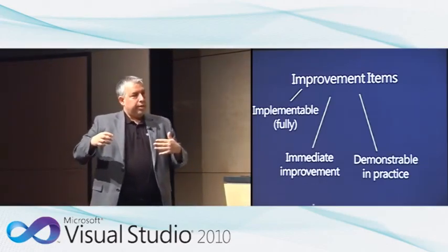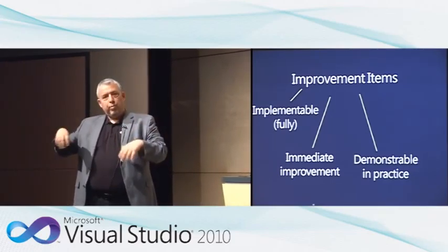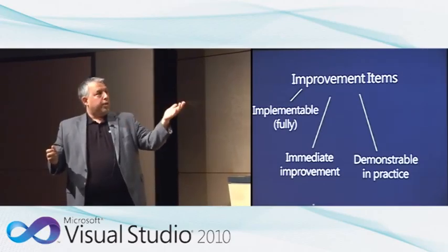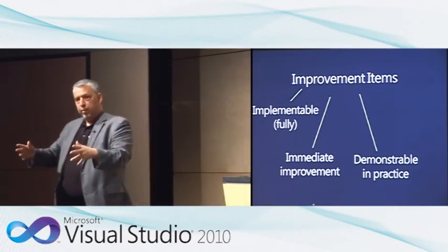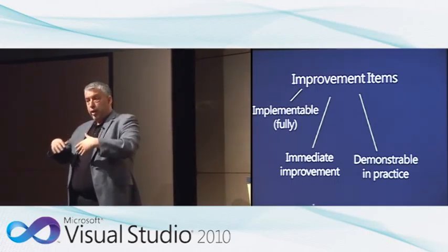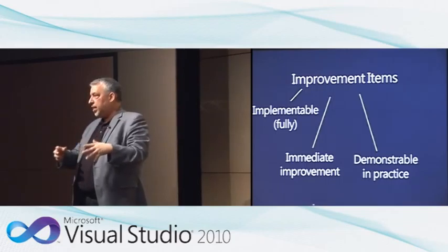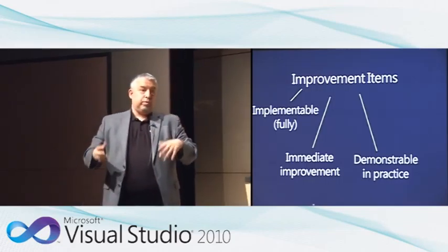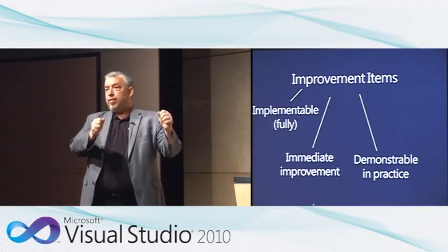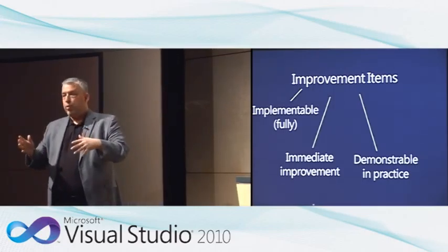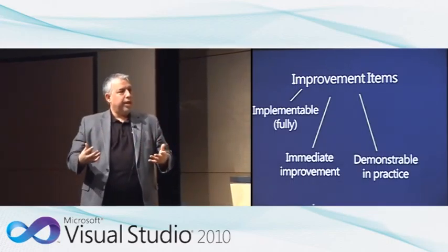So what we're actually expecting is an improvement in practice. We want, instead of showing working code as the way we calculate advancement, for this type of improvement project, what we're showing is actually a team going into the tools or the process they have, the results they should have, the artifact they have, and actually demonstrating to the stakeholders that they're now working this way. And if we don't think we'll be able to work this way, we'll manage with the same Scrum mechanism, we'll work the backlog and so on and so forth.